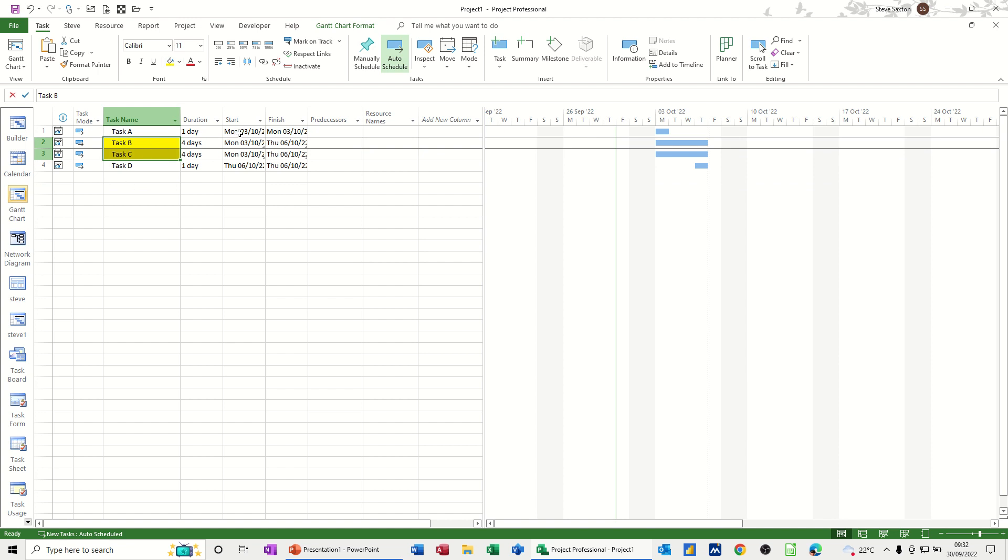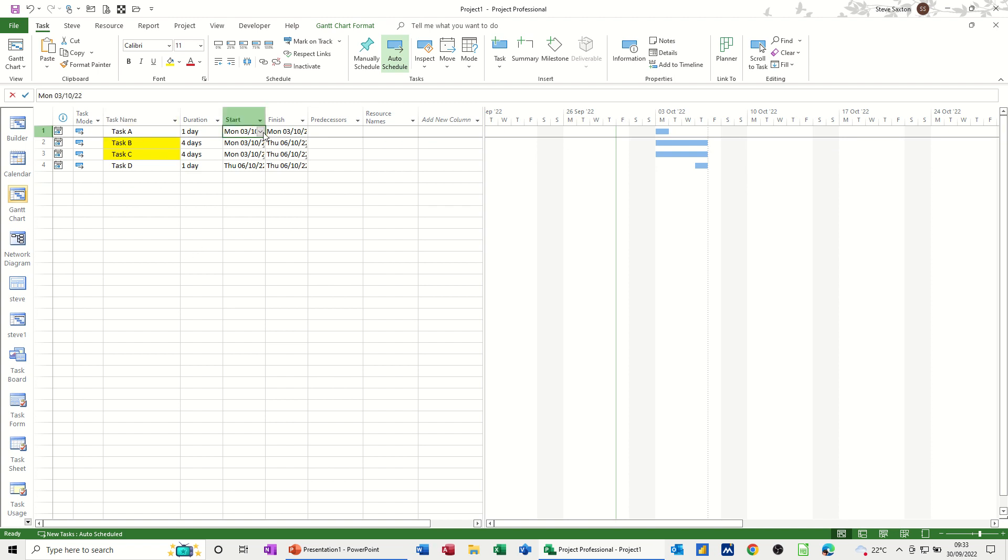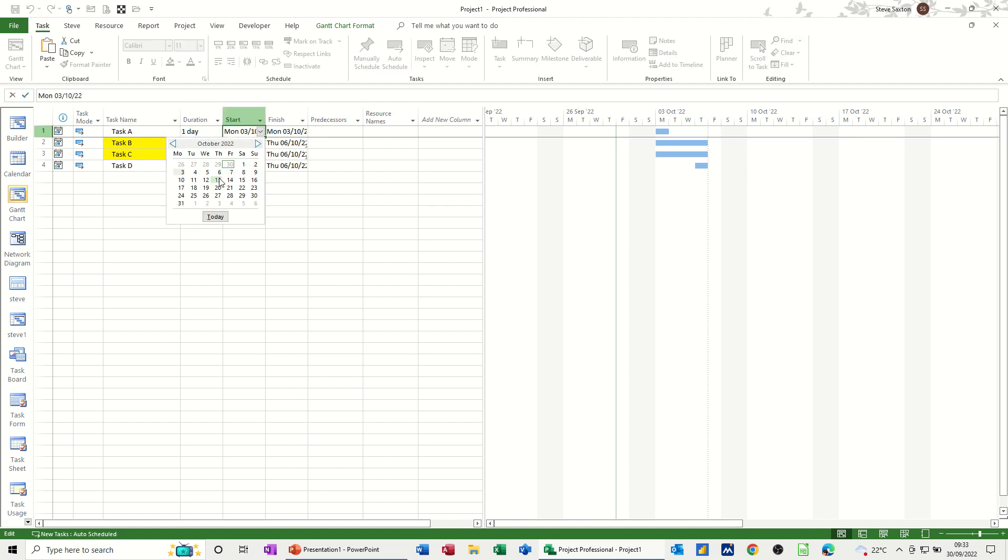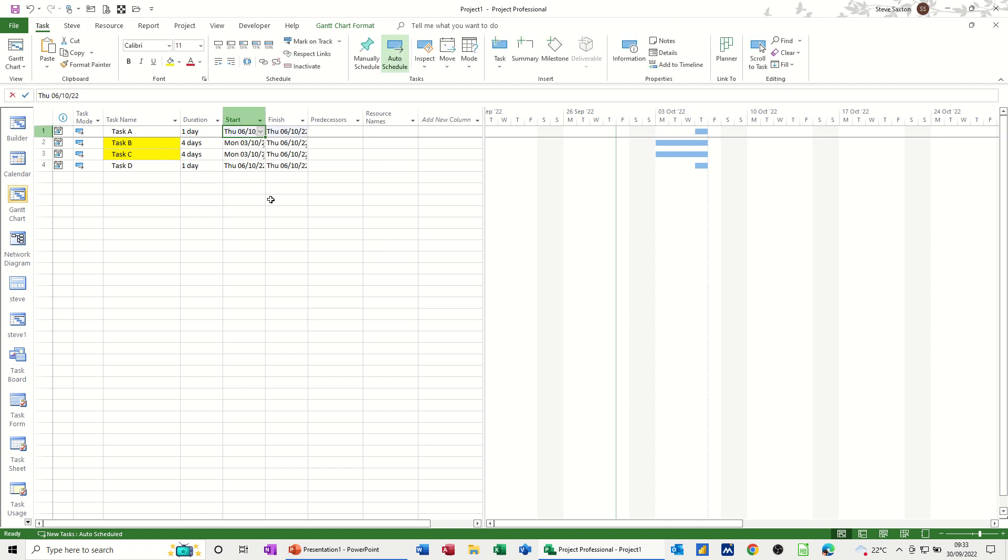So the start of this task A will dictate when these tasks can start. Now if I just change the start of task A and push it forward, say a week, what will happen is the hammock task will move to that duration. Now you can see there's a little bit of a delay before it decides it's going to do it. The first one's moved, now they've both moved.